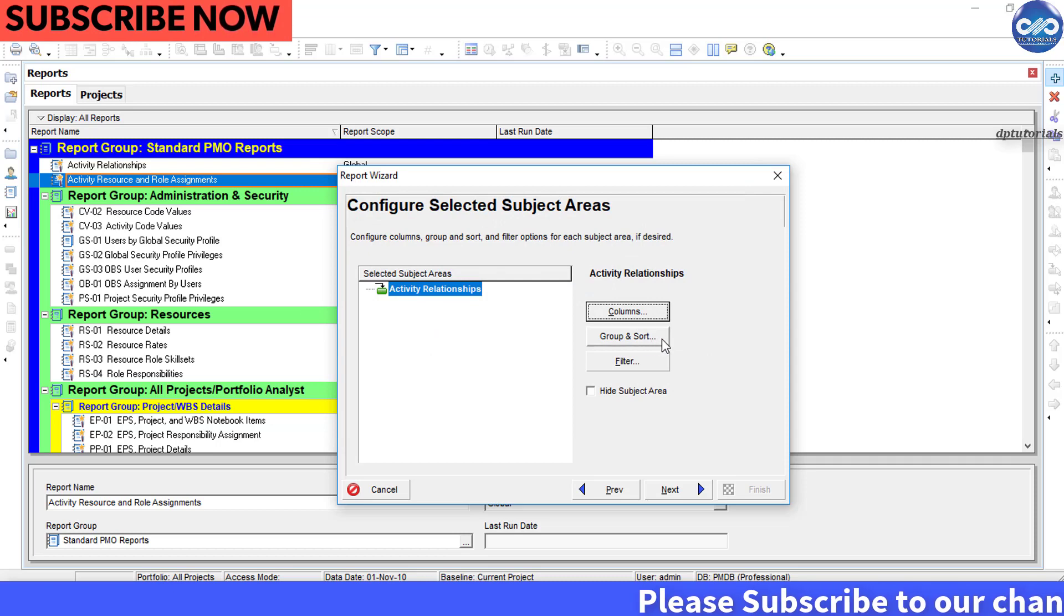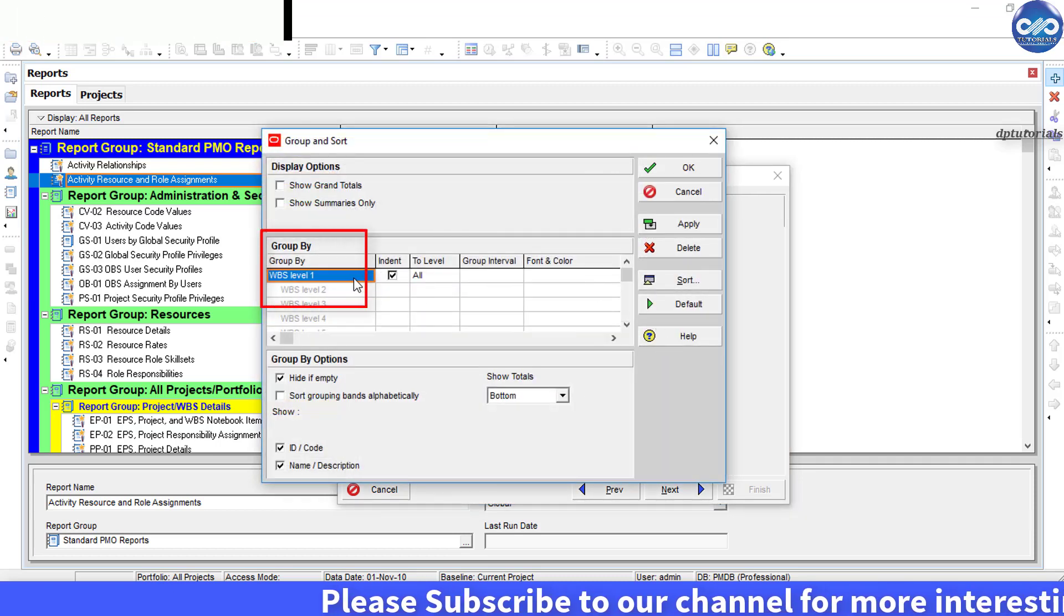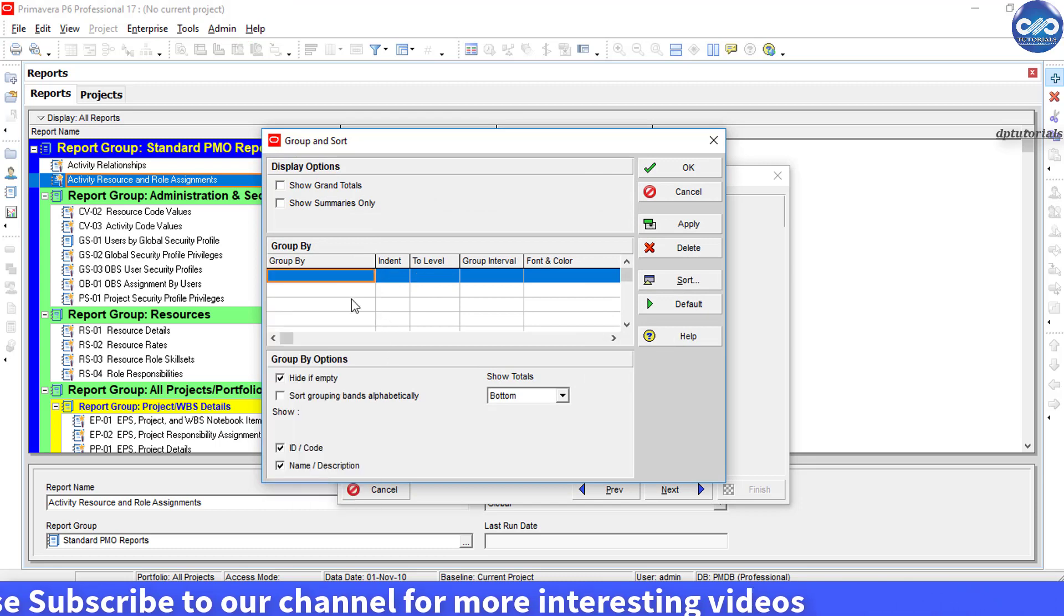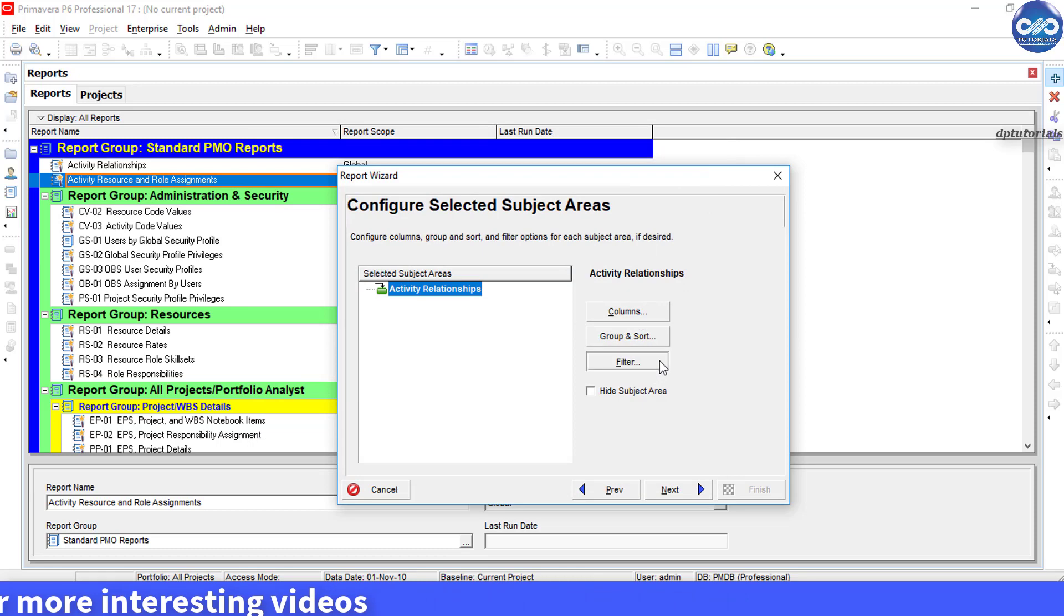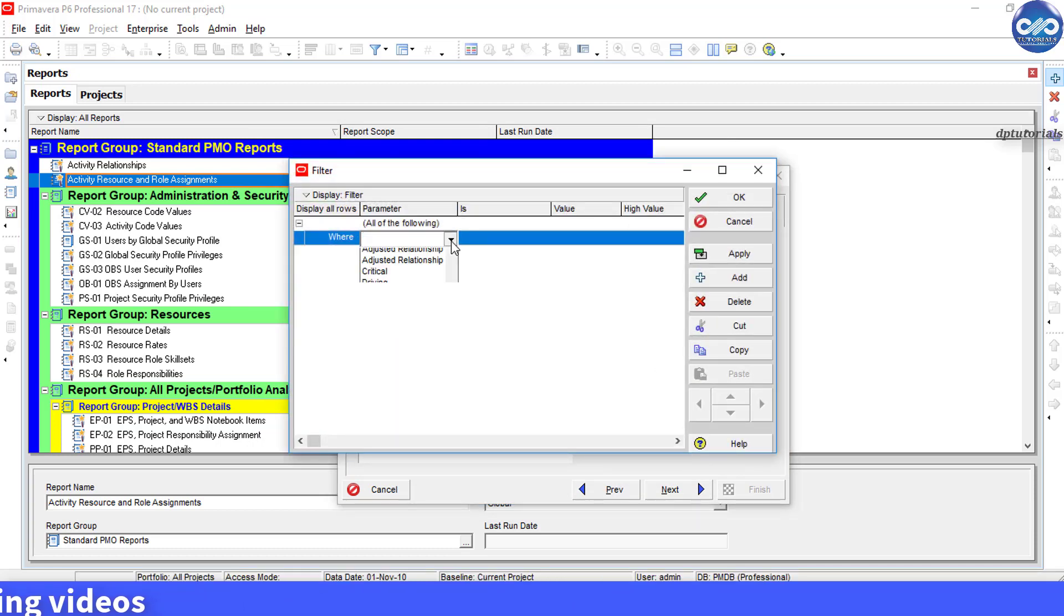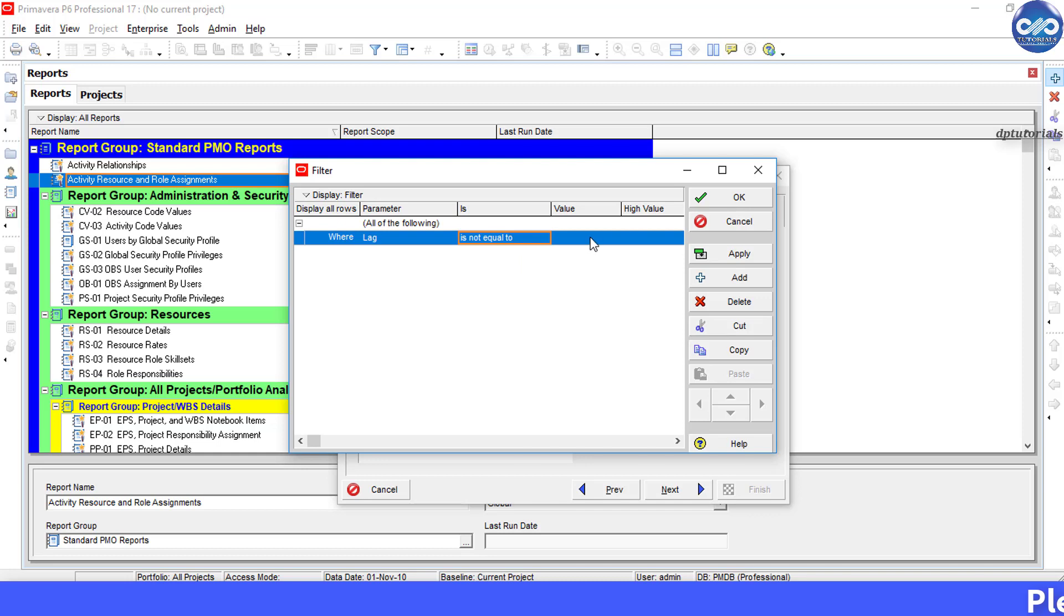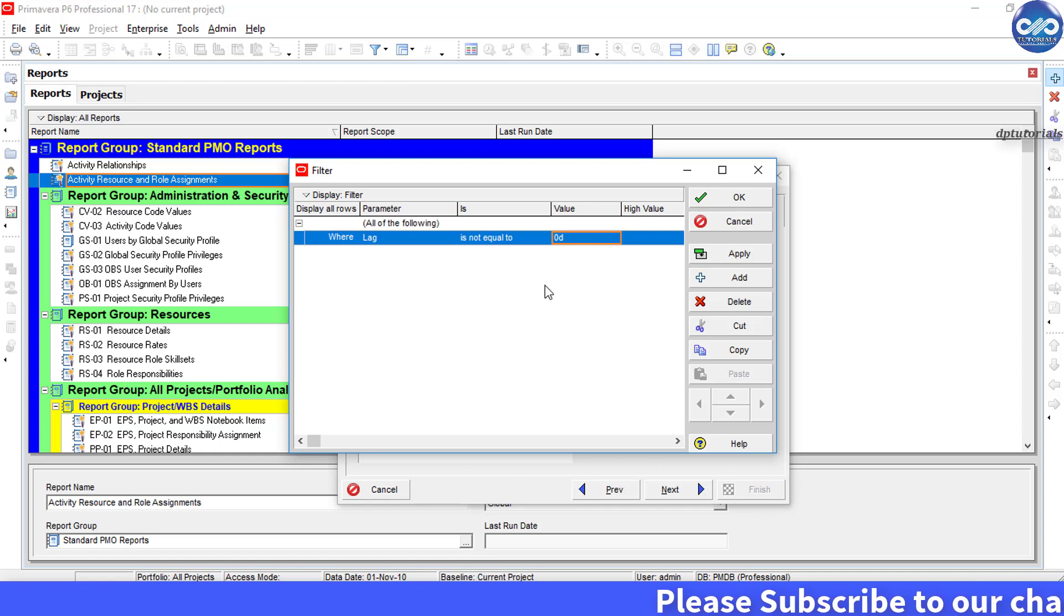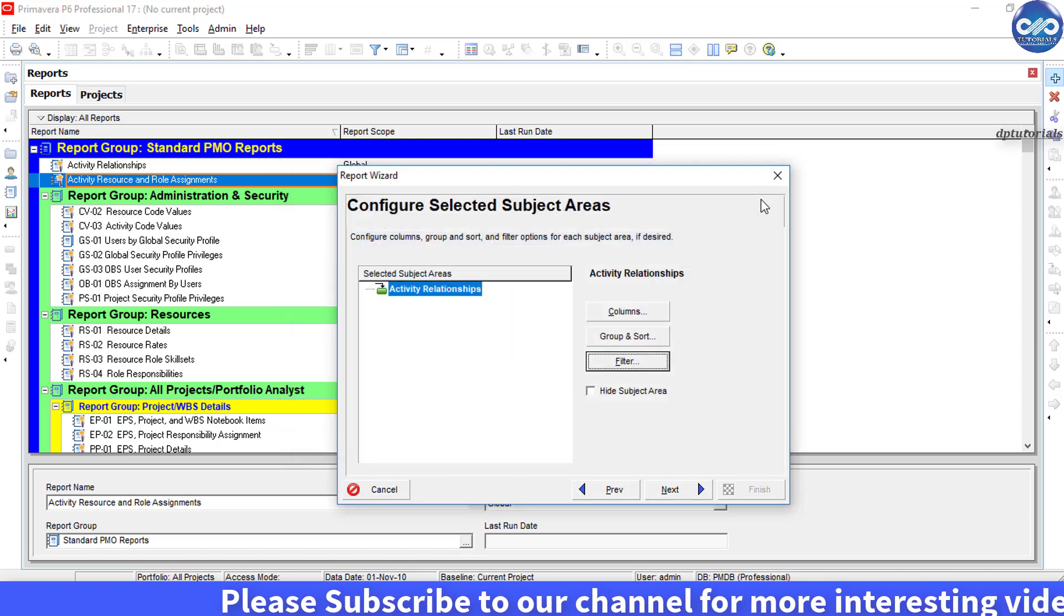Now click on this group and sort. Under group by, select none and then click OK. Now click on filter button. Under parameter, select lag and set the condition as is not equal to, and in the value field put 0 days. So this will filter all lags that are not equal to 0 durations. Now click OK.